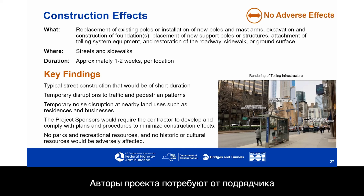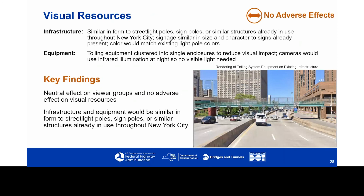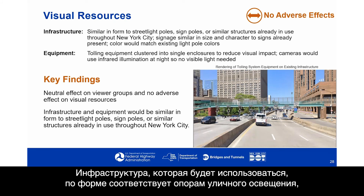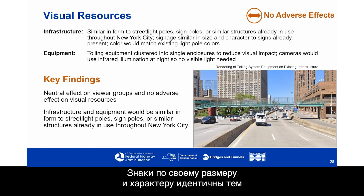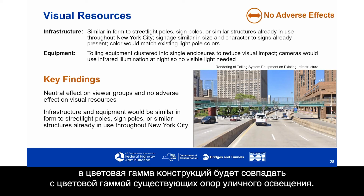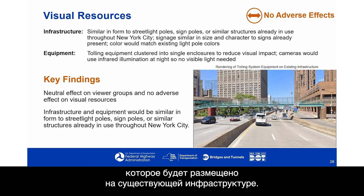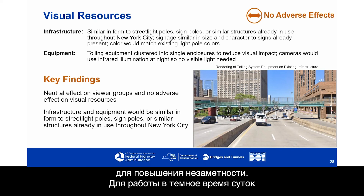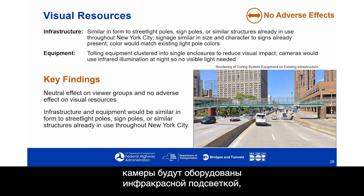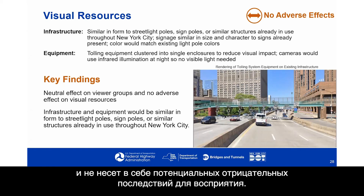Project sponsors would require the contractor to develop and comply with plans and procedures to minimize construction effects. With respect to visual resources, there were also no adverse effects. Infrastructure is similar in form to streetlight poles, sign poles, or similar structures already in use throughout New York City. Signage is similar in size and character to existing signs, and color would match existing light pole colors. The tolling equipment is clustered into single enclosures to reduce visual impact, and cameras would use infrared illumination at night so no visible light is needed. The project would have a neutral effect on viewer groups and no adverse effect on visual resources.